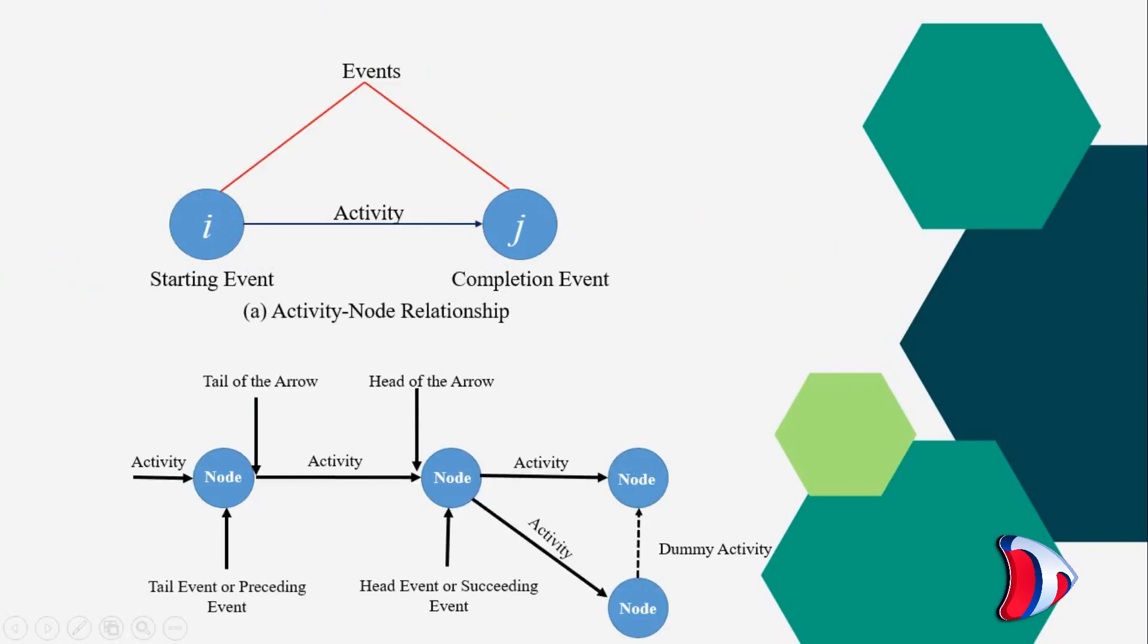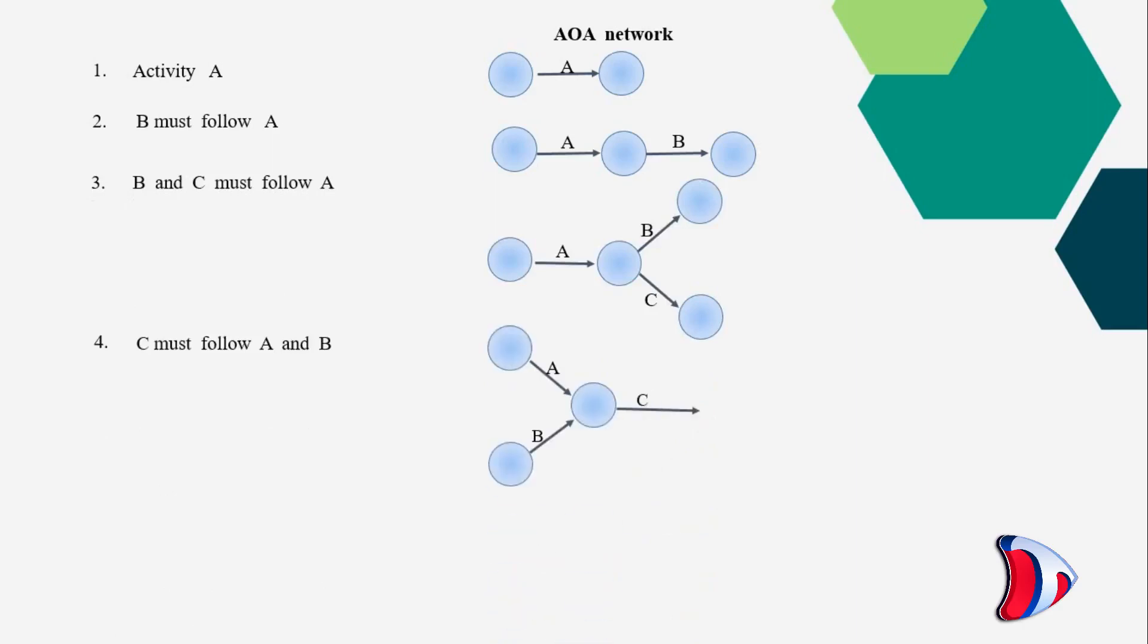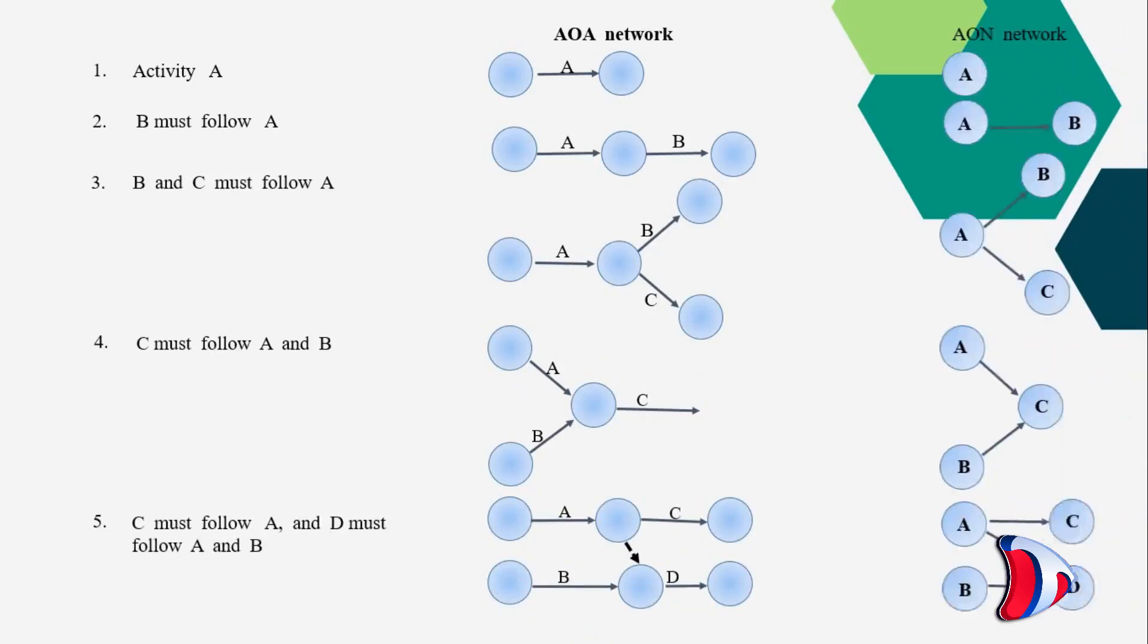The tail of an activity represents the start and head the completion of work. Rules for activity on arrow network construction: activity B must follow activity A. Activity B and C must follow activity A. Activity C must follow activity A and B. Activity C must follow activity A and activity D must follow activity A and activity B.